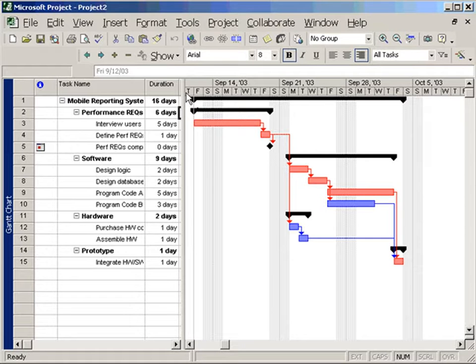To assess sensitivity, the first question you ask is, do we have more than one critical path? If we have more than one critical path, then that increases the likelihood that one of those paths, if it takes longer than planned, will make the other paths non-critical. We look at this network and we see we only have one dominant path, which suggests low sensitivity.